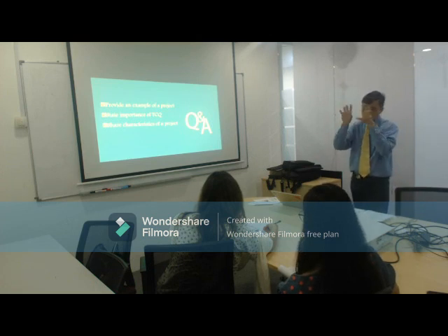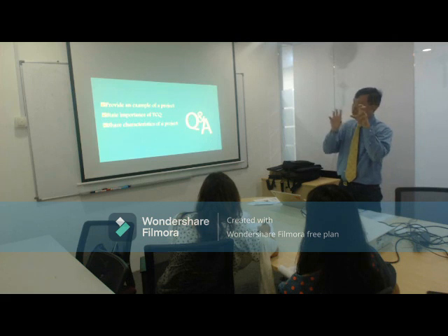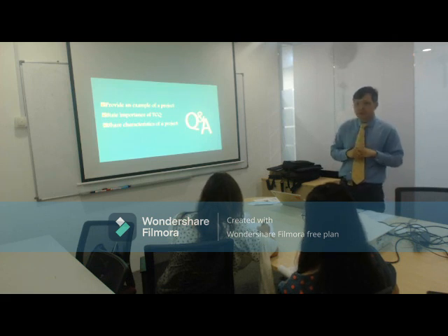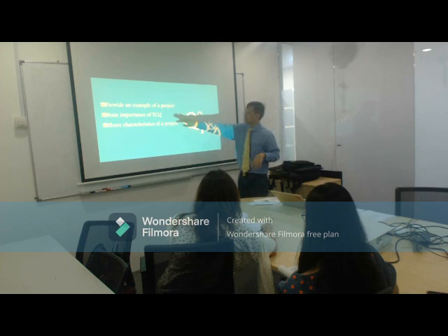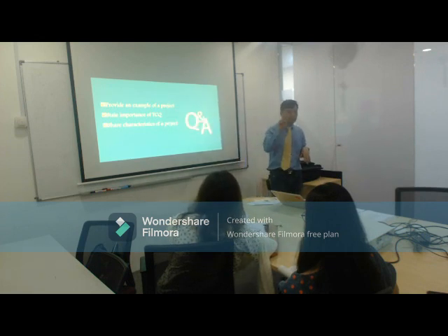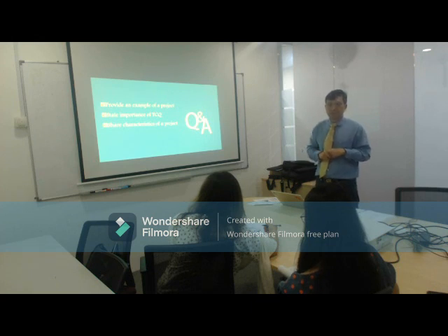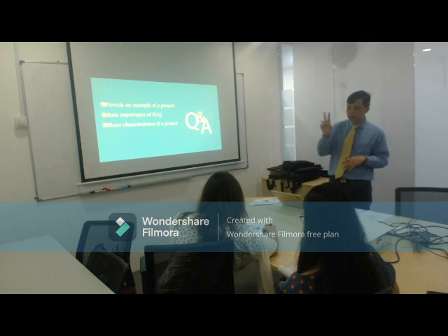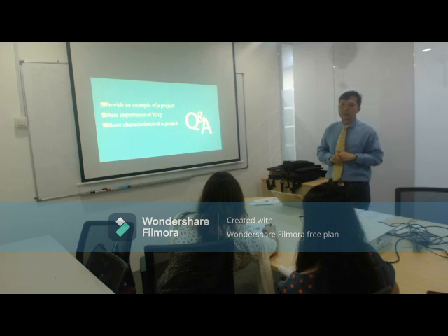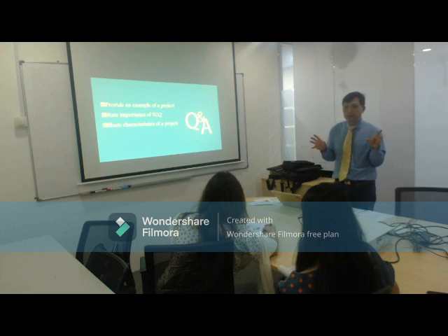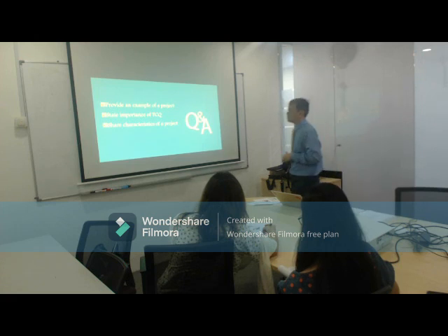That's where if you draw your TCQ diagram, then you can see where the important areas are. Now, why I mention TCQ is that normally for TCQ, you always have 2 that are important, and you always sacrifice 1. In any project, it is very common that we concentrate on 2 and sacrifice 1. So the management has to agree on which one is the one to sacrifice. Once it's agreed at the beginning of the project and everyone agrees on it, then they will just proceed with it. So it's easier.